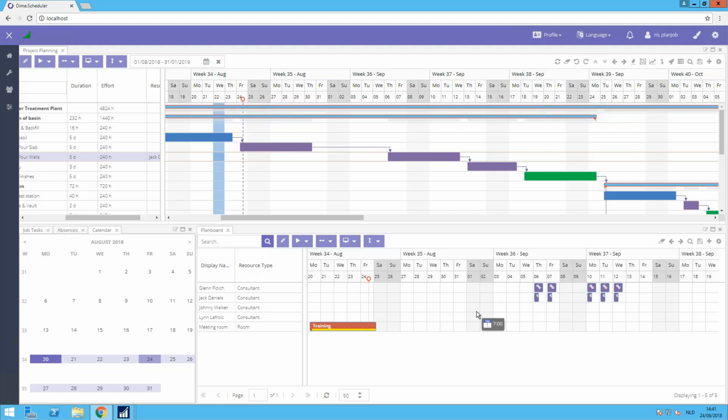As you see, the result in the resource planning is that per day, I should say, of that task, we're going to create an appointment based on the calendar which is linked to that task, or if there's no calendar linked, we fall back to the default base company calendar. As you can see here in my calendar, I had my business hours set from 8 till 4, and I planned 5 days with this task.